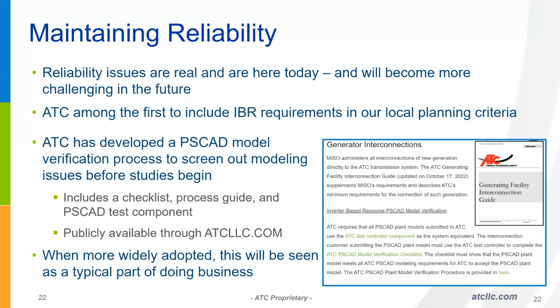So we've done all that, but as part of that, we do ask for PSCAD modeling of generators that are connecting to our system, and that can be challenging for the OEMs to provide, or the consultants who are working with the developers, or the developers themselves. So we've developed a model verification process, and we've got a checklist that we ask to be submitted with the model. It contains usability requirements. I think there's 13 different usability requirements for the model checklist, a comparison of the load flow modeling versus the PSCAD modeling, and then about a dozen different performance tests that the model submitters can perform before submitting the model.